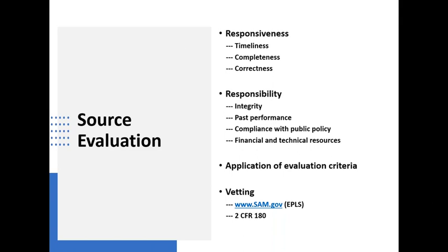Source evaluation involves the application of the evaluation criteria. And so information about scoring sheets, things of that nature come into play here as well. It's entirely possible that in some of your RFP activities, you'll engage in a multiple review process where several people are involved in reviewing the contract offers and scoring them, and the aggregate of those scores becomes the basis for making the selection.